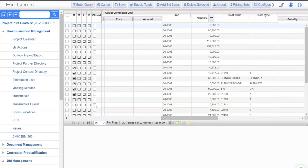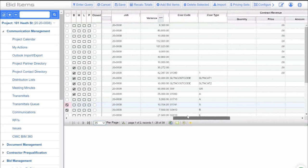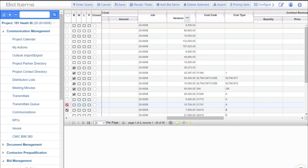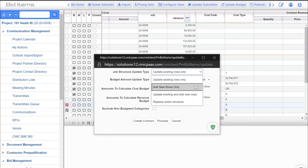I'm going to select line 16 and line 17 on my cost import. When I look at the cost codes and cost types, I'm working with cost code 01741 and 02410. Because this is part of an import from an estimate — this is where you break down your estimates to generate budgets and buyout — I'll go ahead, select those two items, and then update my budget.